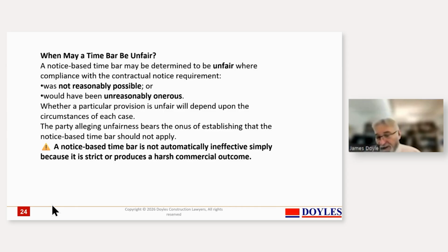That is, the circumstance is that you look at whether it was a sensible provision. The provision that says you notify if you hit hard rock is sensible. It says you've got to notify within 28 or 48 hours. That might be okay, that you uncovered it. But to estimate its extent and the extent of the cost and delay involved might not be sensible to be estimated within 48 hours. And a lot of the time bars are unusually and unreasonably harsh, and they will be attracted to a lot of this as well.